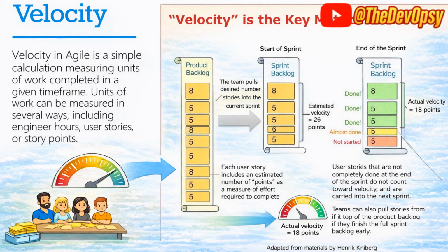And you need to make sure that you increase this velocity, as a standard practice. How can my team increase this velocity? How can we deliver more? This will also give you an estimate of whether we overestimated or underestimated things, right? So here, we think we have underestimated, because we still had 8 story points pending from the sprint, which we assumed would be completed.